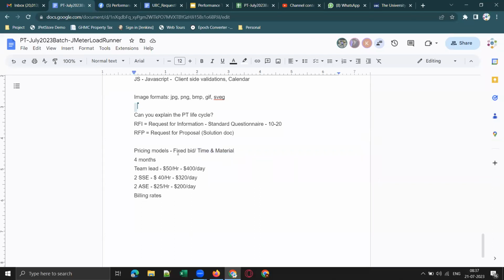Understood, guys? Suppose you gave a building contract, you want to get some building constructed, and you want to give it to a contractor, right? So he will also propose something. He will propose that it will cost you 50 lakhs. That is one way. Let's say the construction cost would be 50 lakhs for the complete building. Or else he will propose another thing also. I will supply you the labor. Please pay me this much per day, 1,000 rupees. Yes or no, guys?